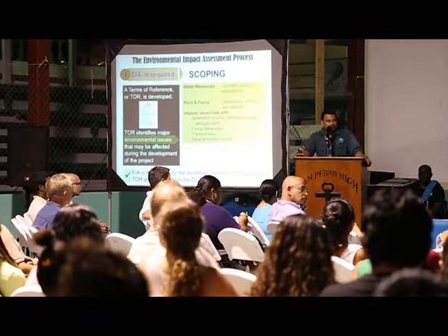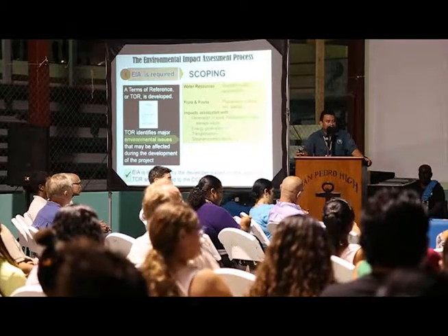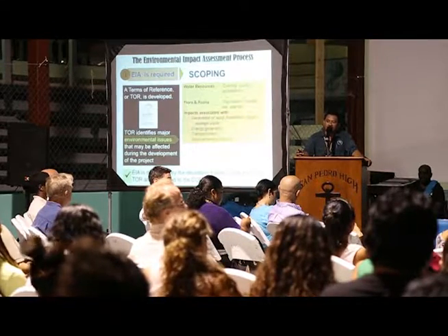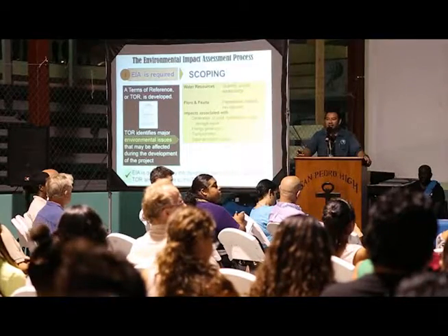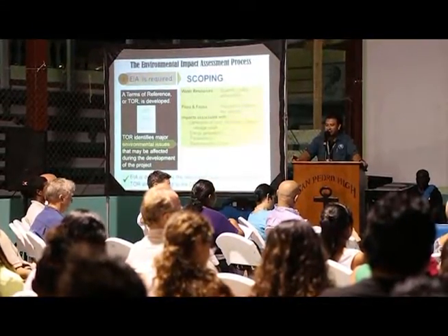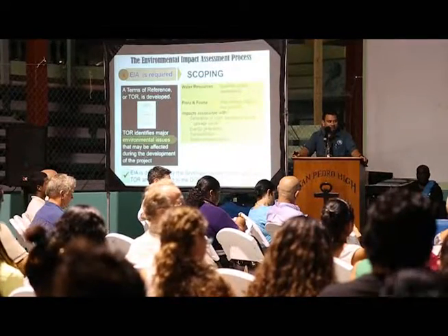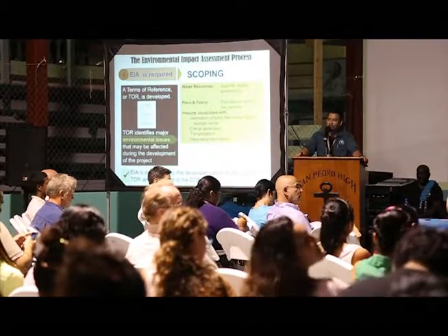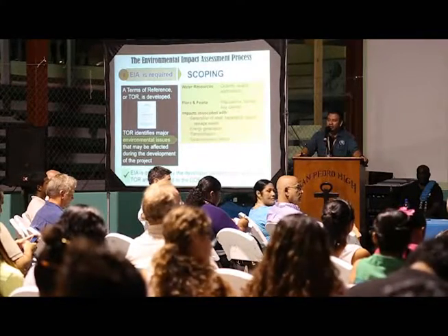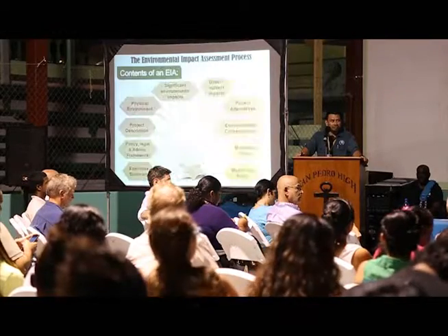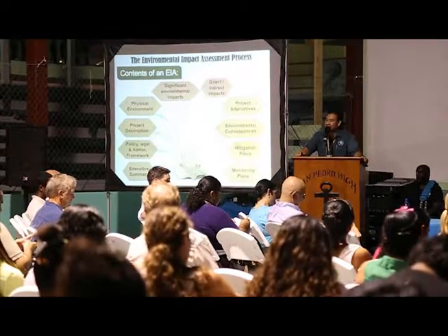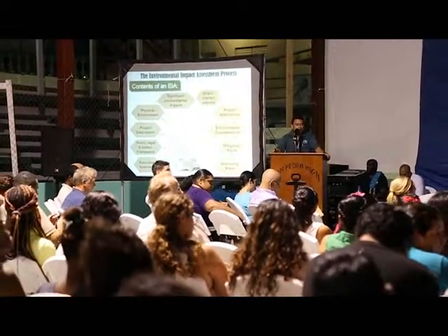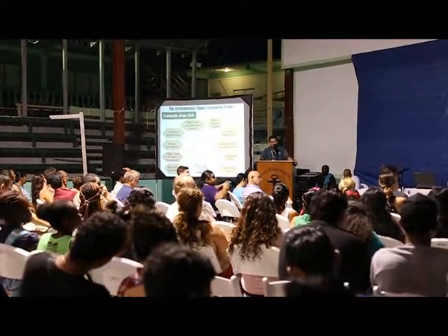And this terms of reference is by legislation developed by the developer and is approved by the Department of the Environment. The legislation says that the environmental impact assessment cannot commence unless the terms of reference is approved. So the department had approved these terms of reference, and the developer was given the authority to proceed to prepare the environmental impact assessment report. I mentioned that the legislation clearly defines what needs to be in an environmental impact assessment. And it's being summarized on this slide for us.